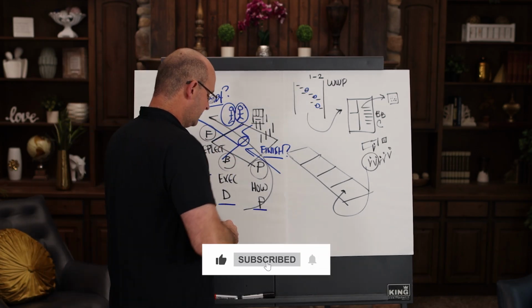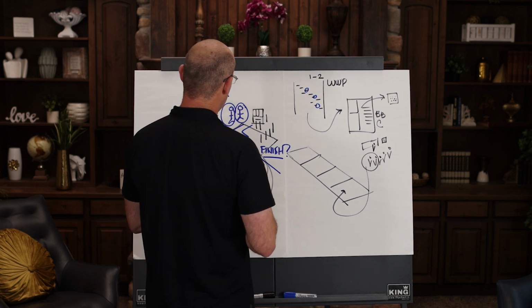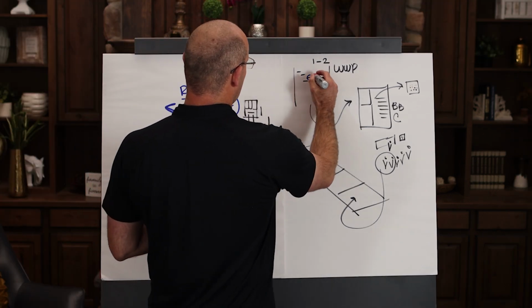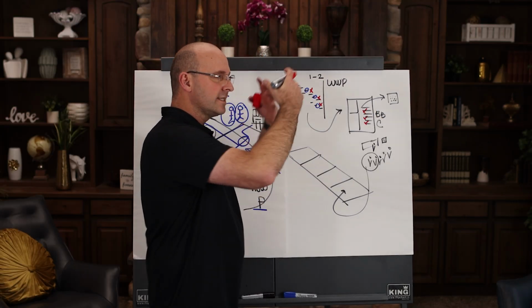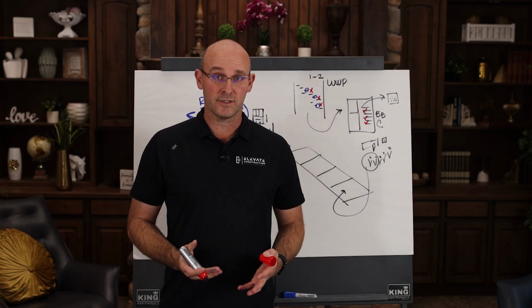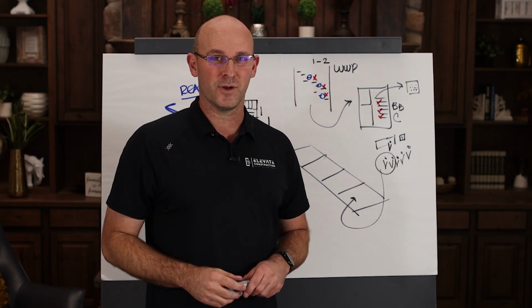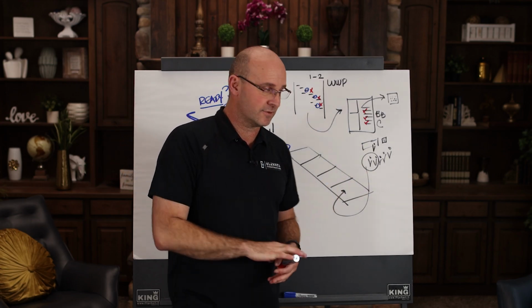And what happens is when the lead person, the superintendent, the foreman, whoever's out there, the zone managers, are having these conversations, if there's problems, we mark it on the day plan or the weekly work plan. And then that's the information that's brought to the team daily huddle. And that's how we work with the project delivery team to clear the way and solve problems. It's a feedback loop. And we connect the project delivery team to field operations.